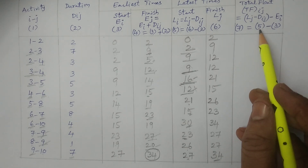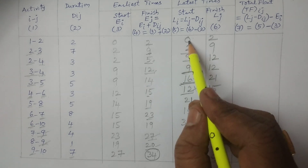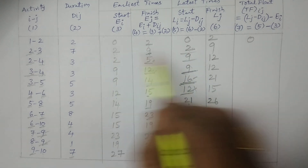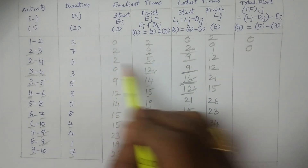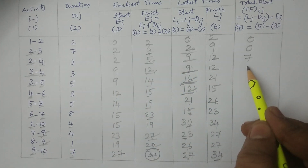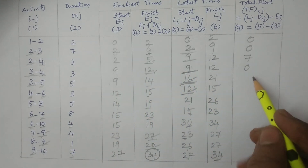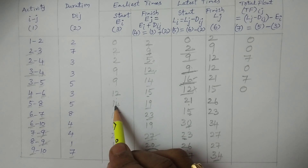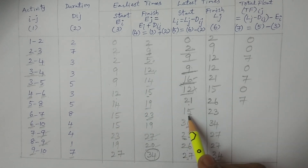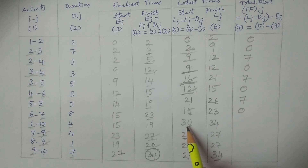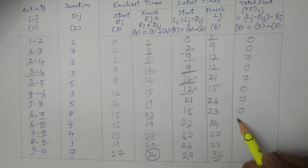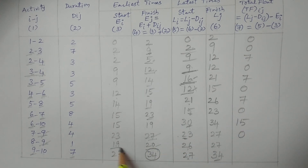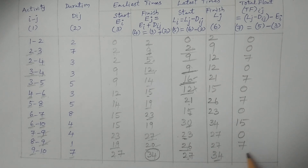Now total float — simple subtraction of column 5 minus column 3. Results: 0 minus 0 equals 0; 2 minus 2 equals 0; 9 minus 2 equals 7; 9 minus 9 equals 0; 16 minus 9 equals 7; 12 minus 12 equals 0; 21 minus 14 equals 7; 15 minus 15 equals 0; 30 minus 15 equals 15; 23 minus 23 equals 0; 26 minus 19 equals 7; 27 minus 27 equals 0.